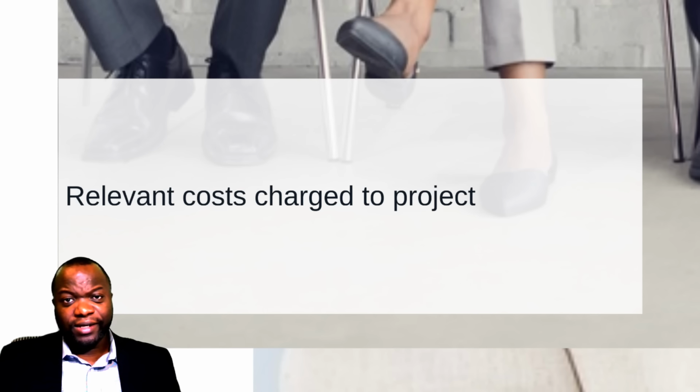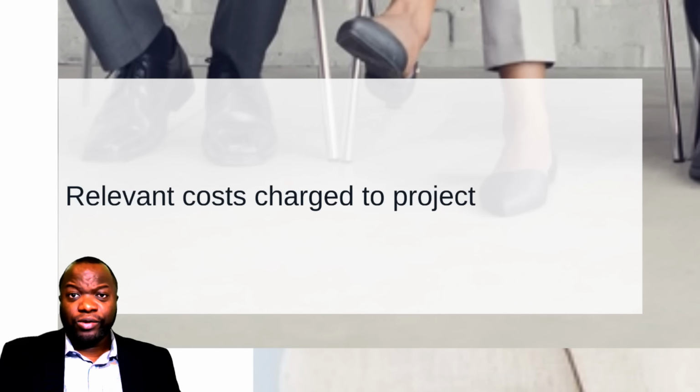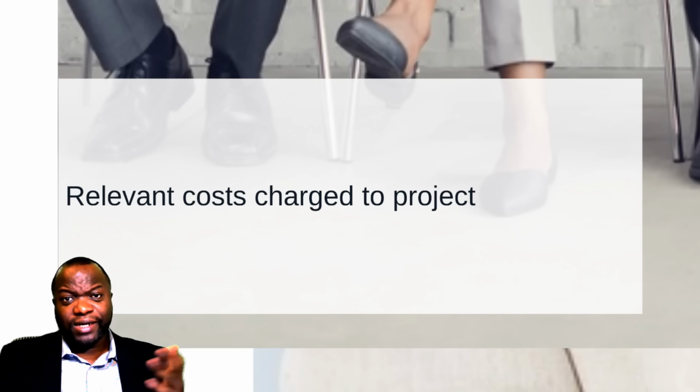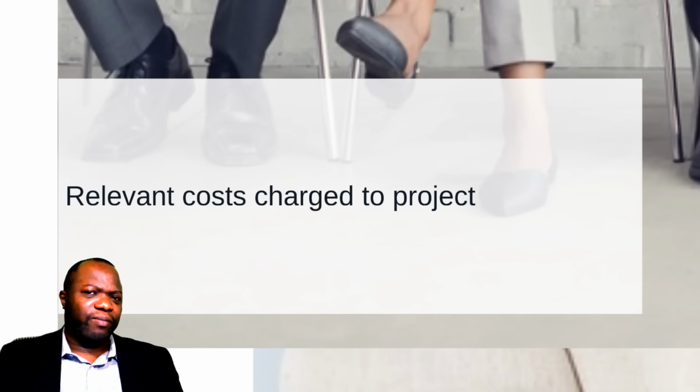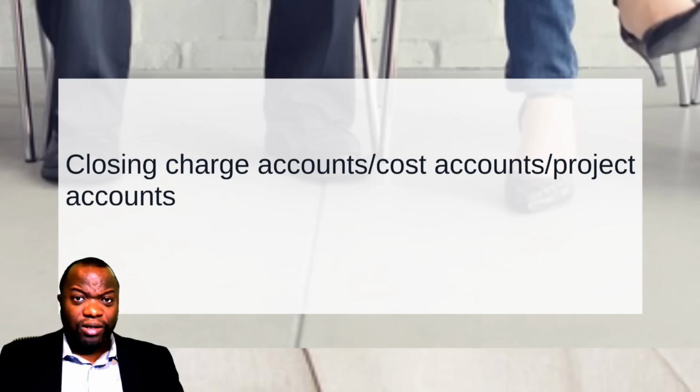I cannot overstate this. In organizations where they use charge numbers and cost centers, you know very well that on a lot of projects, there's a mismatch with the cost center and the charge. You don't want that to happen. You want to make sure that all of those charges have hit, because once the project is closed, it's a pain in the neck jumping through all of those hoops to get accounting or finance to reopen that charge number. And then everyone's looking at you, your name's blacklisted as the PM who didn't know what he or she was doing. No, you don't want that to happen. So you want to check off on all of these things. It could lead to big problems in some firms.